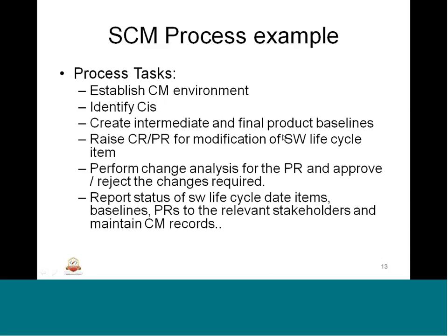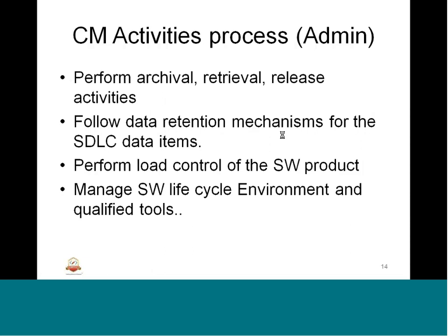Okay, so next, the CM activities process. From the admin perspective, as I said, the admin could be a change controller or a dedicated change controller could be there. The admin can be different, but in most mid-sized projects the admin and the change controller will be the same for the particular project. So what he does is perform archival, retrieval, release activities. He follows the data retention mechanism for the SDLC data items. As I said, retention is an important thing. We need to retain the project lifecycle artifacts till the term or the guarantee, or as long as the project is maintained in the organization in relation to the customer.